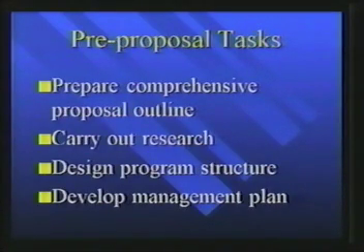For example, one of the tasks is carry out research. Here I've really broken it down into the theoretical research, instructional background, and things like budget research, travel research, hardware research. So we've broken it down into separate tasks. What Microsoft Project has really allowed me to do is to lay out a plan of attack.